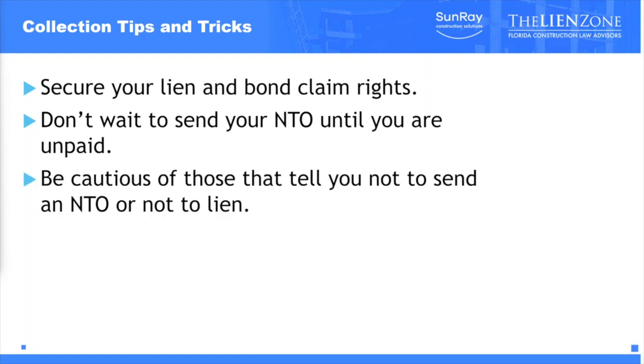Be very cautious about anyone that tells you not to send a notice to owner or not to lien the job. Technically, that's illegal in the state of Florida. No one can prevent you from sending a notice to owner or recording a lien, but just be careful. We hear clients tell us about, well, so-and-so owner or contractor told me that they won't pay me if I record a lien, or they won't pay me if I serve a notice to owner. Just be very careful about those folks, because once you let that 45 days go on the notice to owner or the 90 days on the lien, there's nothing anyone can do to give you those rights back if you don't get paid.